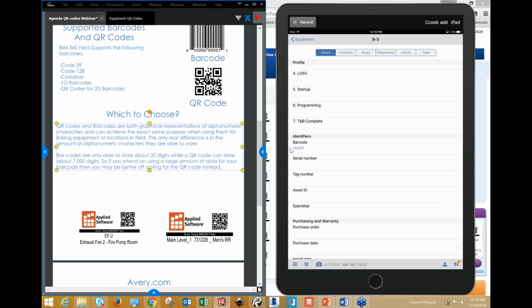And that's another reason that I just recommend always put your barcode information in there at the beginning. And in my opinion, it should be a requirement because it is very difficult to later go in and do locations. Now, just to preempt the question about equipment, that doesn't necessarily apply to equipment. There is a workaround and a way to get your barcodes associated with equipment at a later date. It's a little in depth, so I'm not going to go through it on this webinar, but if you need to reach out to us to talk about that, we can probably help you with that.